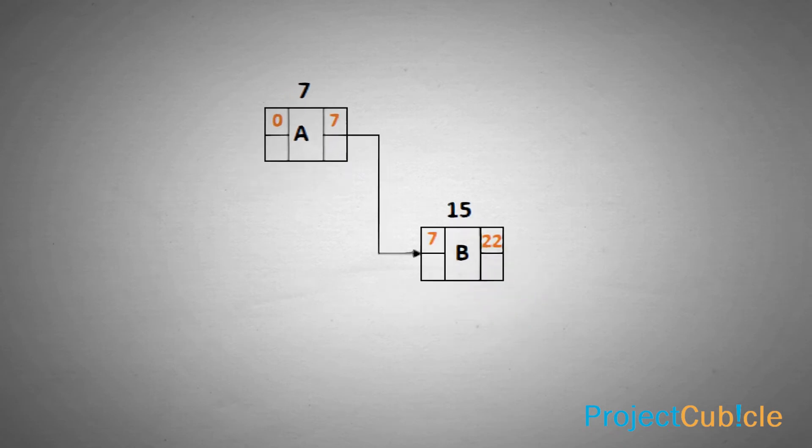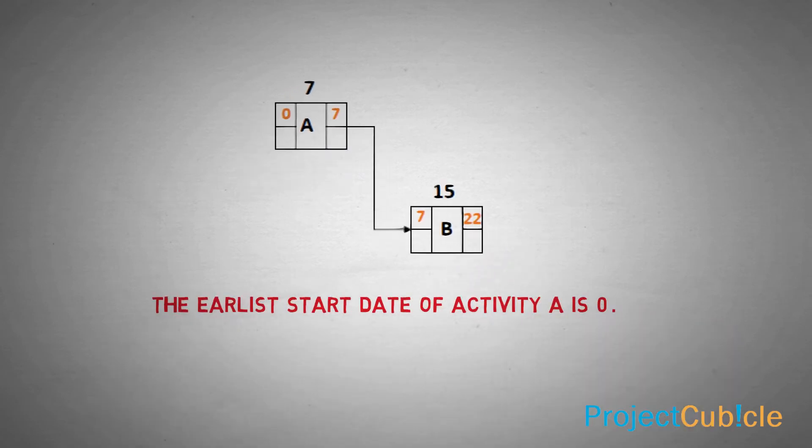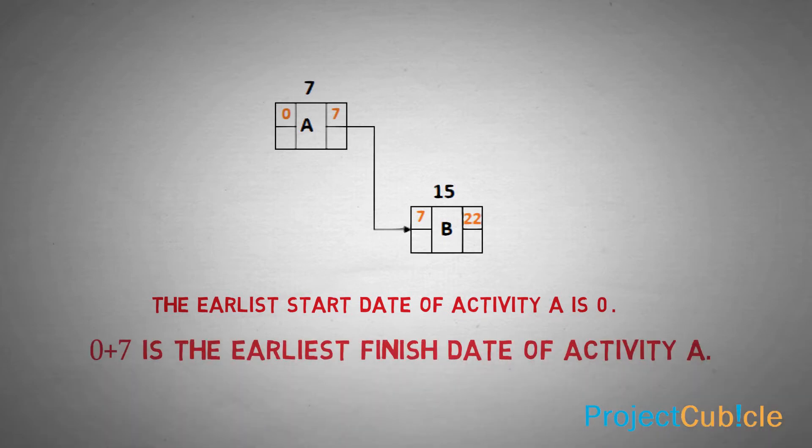the project begins at date 0. So the earliest start date of activity A is 0. 0 plus 7 is the earliest finish date of activity A.